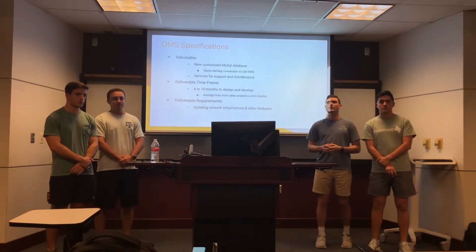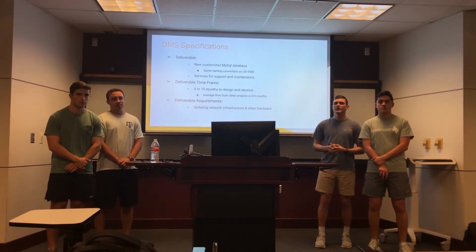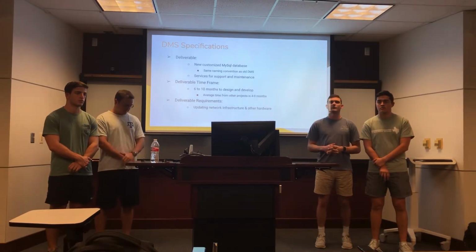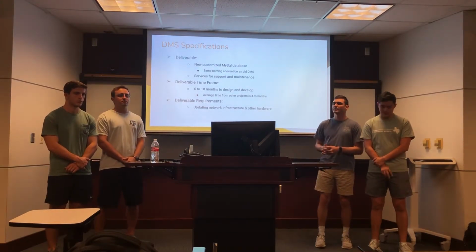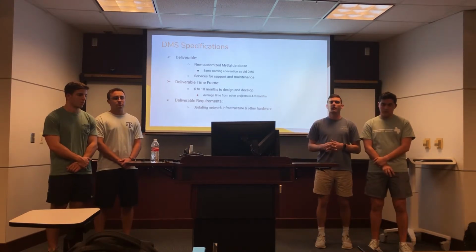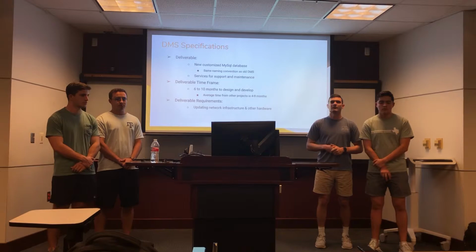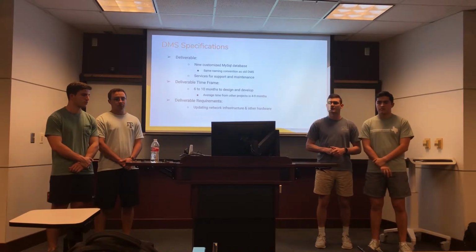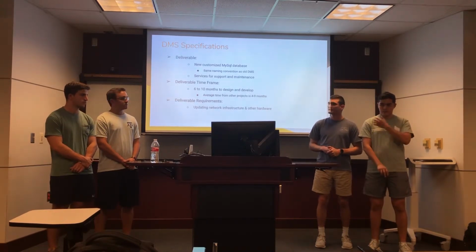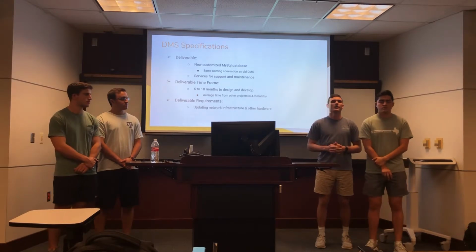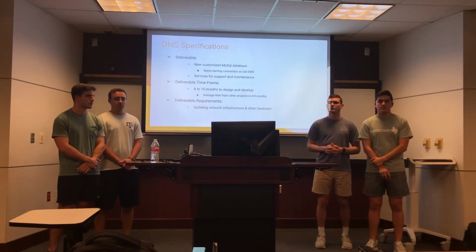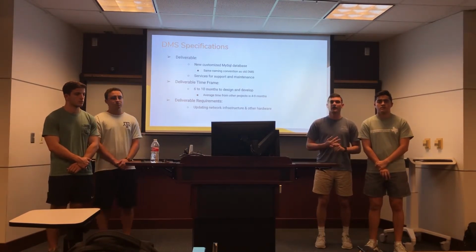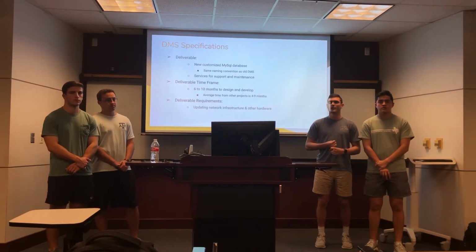maintenance. As far as our delivery timeframe goes, we expect this to take between 6 and 10 months to design and develop in full. We realize that the average project time is around 4 to 9 months of this scope, but considering our resources that we have at our disposal, considering our time constraints and other factors, we feel that this will take a little bit longer than your average project time. As far as our requirements and things of that nature, we will need to update our network infrastructure and other hardware. So this includes every client PC, every server, and cabling and other hardware things that go along with it.